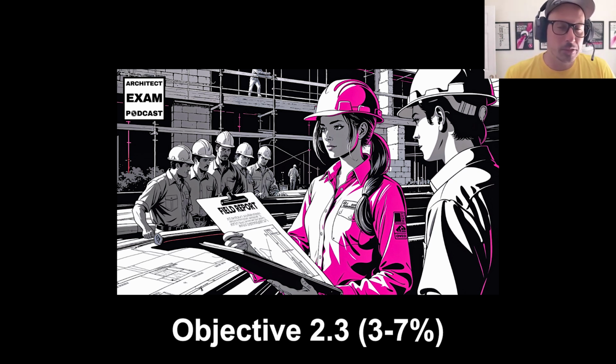When reviewing work against the construction schedule, you need to understand different types of construction schedules, verify that milestones are being met, track the progress using established methodologies, review schedule updates, and identify any schedule slippage that might impact project completion. I'd also say reviewing work against the schedule of values is just as important. You need to understand the purpose and structure of the schedule of values, assess percentage completion for payment applications, ensure the schedule of values has an appropriate level of detail, be able to detect front-loading and other payment issues, and maintain proper documentation for any payment disputes.